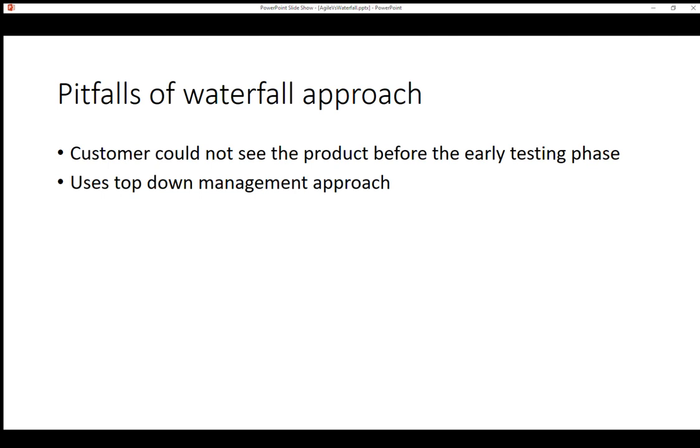The software industry started debating the manufacturing-like approach, which is the waterfall approach used for developing software, as early as the 90s. According to a 1994 Standish Group report, only around 16% of the projects surveyed were successfully finished within budget and on time with the features originally scoped. 53% of software projects went either over budget, lacked features, did not finish on time, or a combination of these. So clearly a new approach was required for software development, which is agile methodologies.